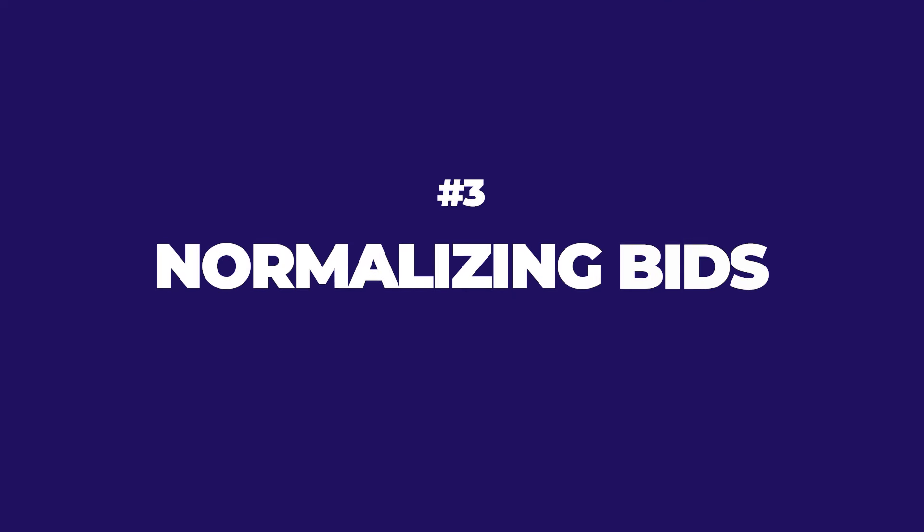Number three: normalizing bids. This is where having the right format is absolutely key. Hopefully you've provided a template so you don't waste time translating and interpreting everything. Normalizing bids means you're able to compare them and the information is consistent. This involves adjusting bids to account for variations in scope, specifications, or pricing assumptions, allowing you to compare apples to apples instead of apples to oranges.